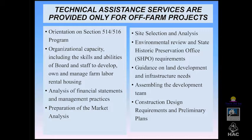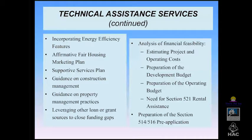The next step is determining whether there is a need for farm worker housing in the area where you'd like to develop. We provide technical assistance on preparation of the market analysis using guidance provided in funding announcements and handbooks. We also assess the proposed site — if a site hasn't been selected, we help conduct feasibility reviews. Site selection analysis includes an environmental review, State Historic Preservation Office clearances, and guidance on land development, infrastructure needs, assembling the development team, construction design requirements, and developing preliminary plans.